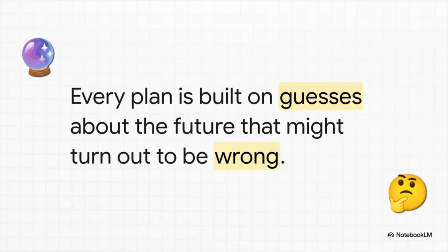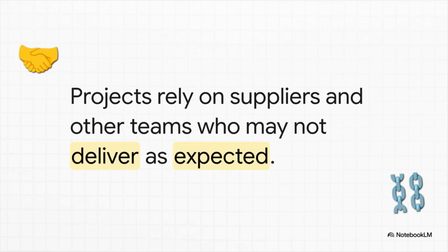Third, we have assumptions. And let's be real. Every project plan is basically a collection of educated guesses. We just assume the key people will be available, the funding will come through, the market will stay the same. We have to make these guesses, but if even one of them is wrong, the whole house of cards can start to wobble.